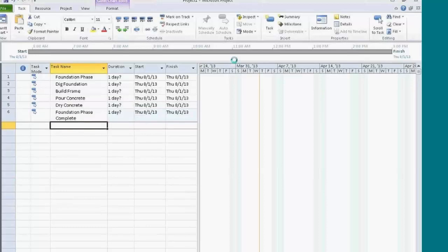You'll notice I'm not filling out the duration. All I do is sit and brainstorm. The reason for the question mark on 1 day is that it means it's an estimate. When you fill out a task name, it fills out a default duration of 1 day and marks it as an estimate. But you can use that question mark for any type of duration, and it always means estimate. When you do your reports, in brackets, it will say estimate.